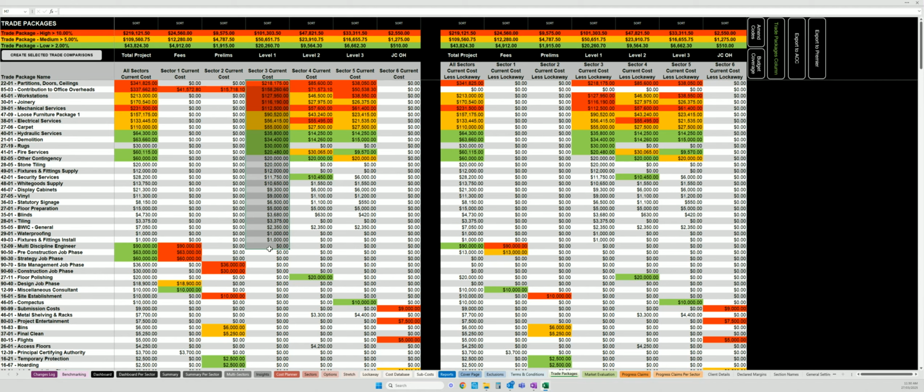And when we come to evaluate separable portion 2, which may be in sector 4, I'll do an evaluation on separable portion 2. So you have the ability to undertake evaluations on the total scope, on a portion of the scope, on all of your costs, or on all of your costs that have yet to be locked away. So really quite a lot of flexibility and functionality in how you undertake your detailed trade comparisons.